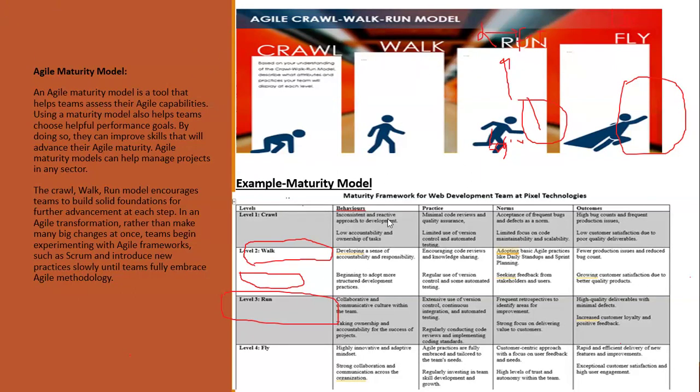How do you measure their team maturity in Agile? That is where this comes in. They call it the Agile maturity model. As a Scrum Master, you need to know this. There are so many models, but I think this one is simple for you to understand how it works. Also know that if you ask how many months it will take to transition a non-agile team to an agile team, I think the minimum is 6 months. You cannot transition somebody into the Agile space in 1 month.